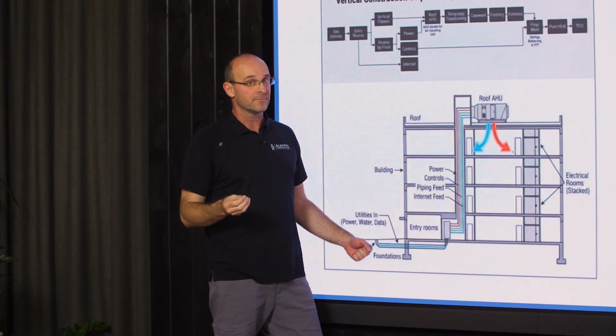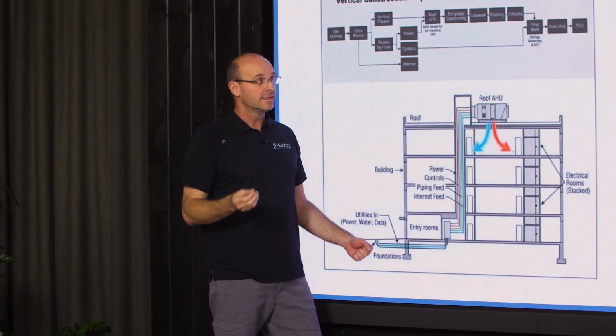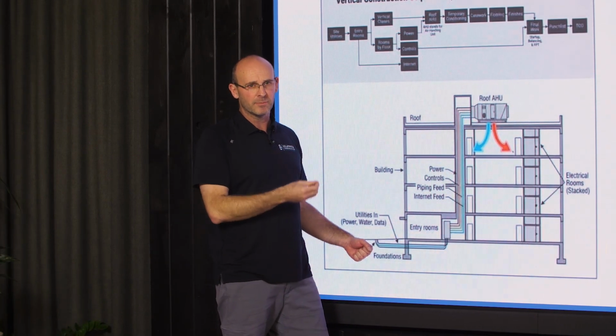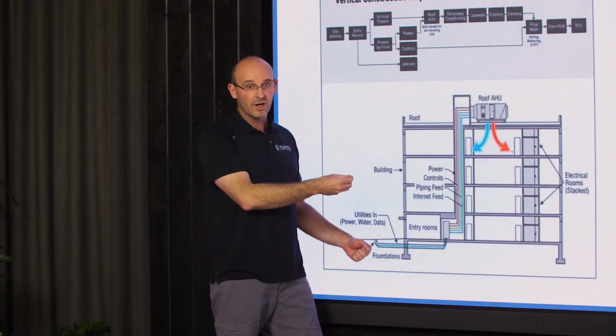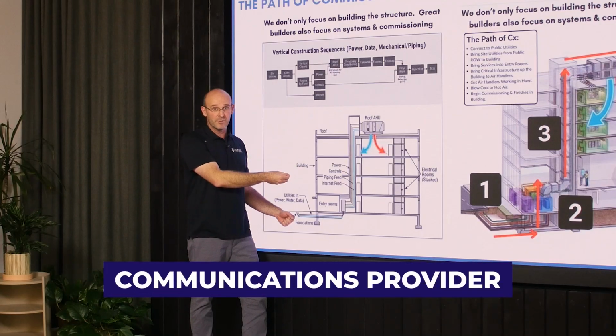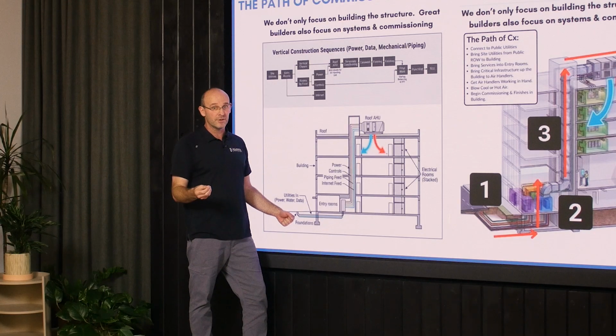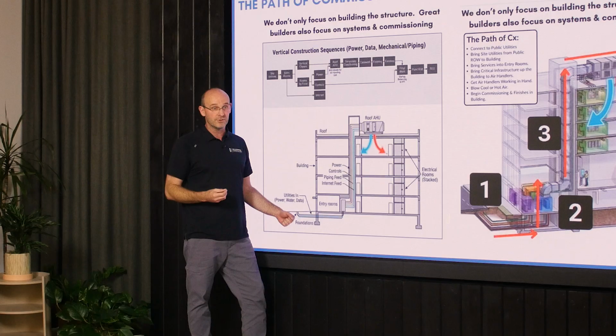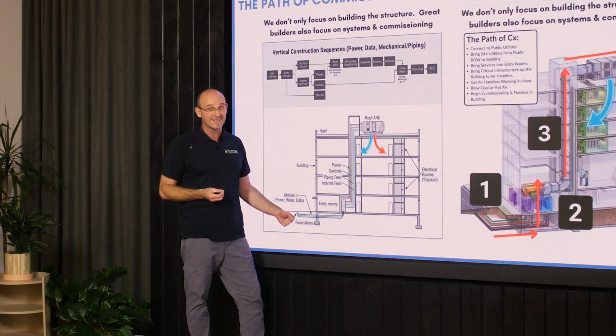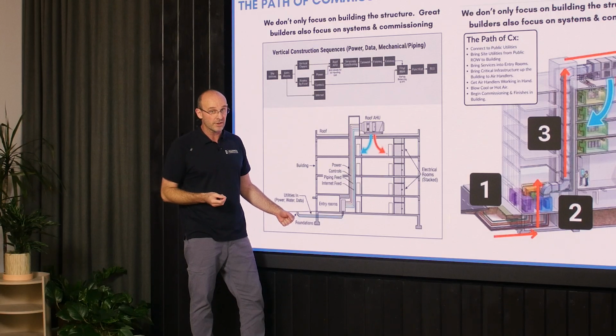But here's the thing. You may have to deal with a bureaucratic power supplier to actually feed power to the project. You might need to contact the communications provider to see how you're going to feed the project. You might need a road upgrade to actually connect to the sewer. You might need to do some pretty complex things to tie into potable water.